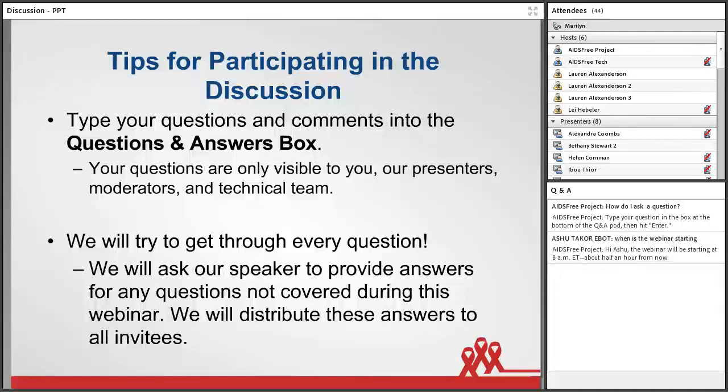If you're monitoring on a monthly basis, then you have the opportunity to adjust and make some changes in your rollout plan. If you make a plan and then just start implementing it without monitoring, then you get into supply issues. So that's just what I wanted to add.